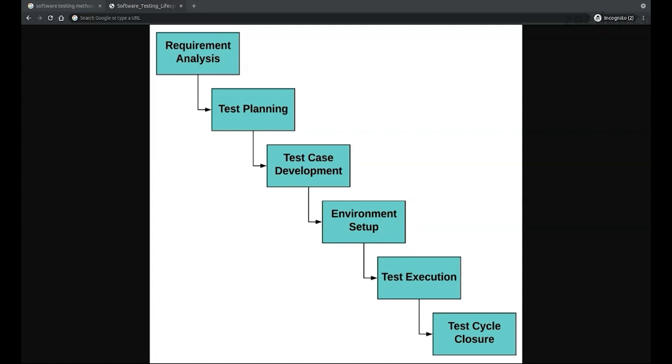There are again certain advantages and certain disadvantages of this. The main advantage of iterative development is that test feedback is immediately available at the end of each cycle. The disadvantage is that this model increases communication overheads significantly, since at the end of each cycle, feedback about deliverables, effort, etc. must be given.